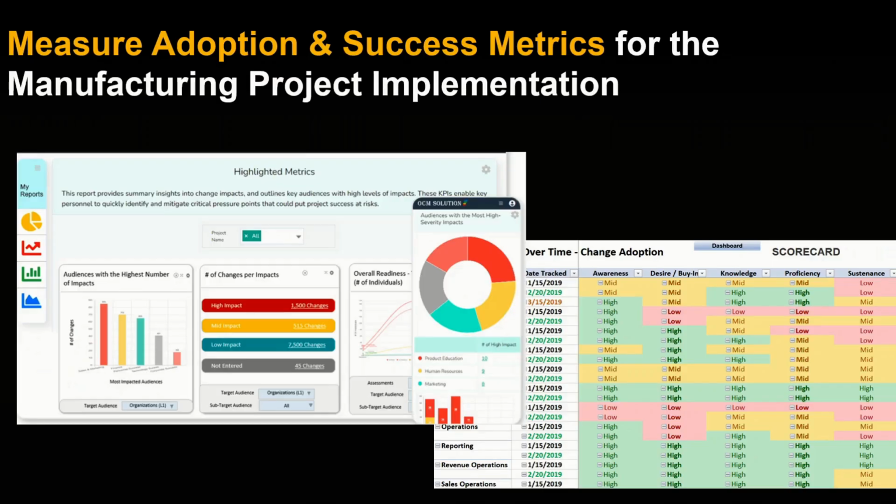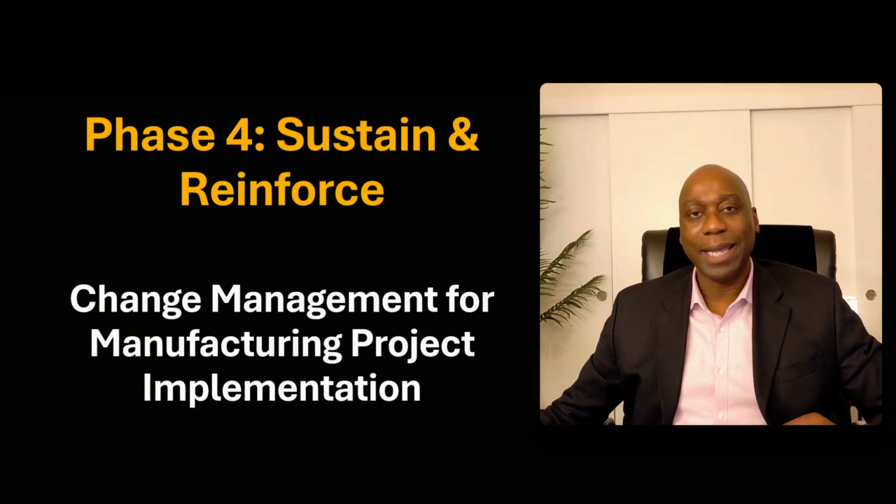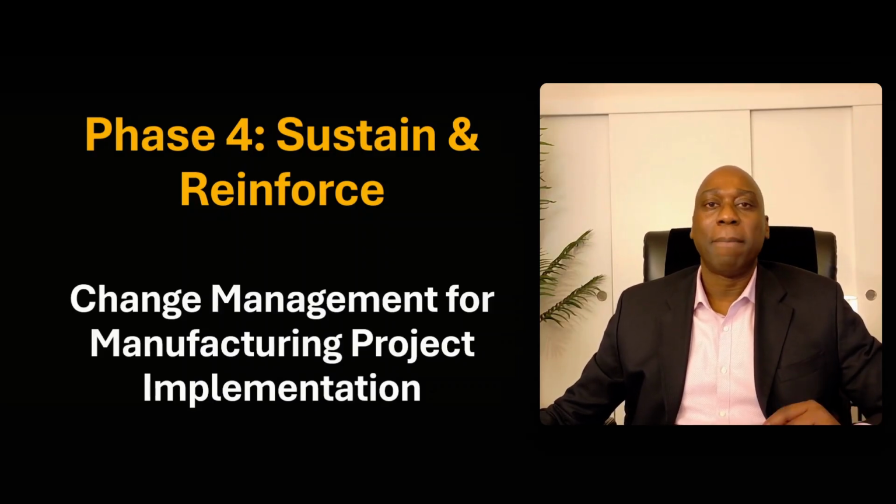You also want to track key adoption metrics like user usage. How are people using the new solution? You also want to track training completion, as well as tracking FAQs, as well as any feedback sentiment that you are getting. Phase 4 is where we sustain and reinforce the new behaviors for the manufacturing implementation.